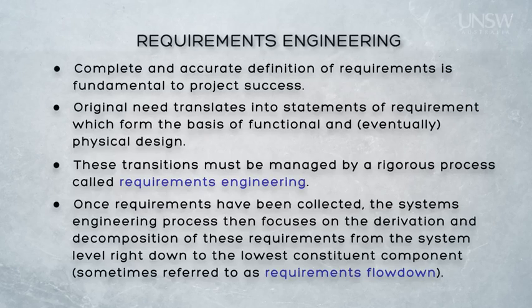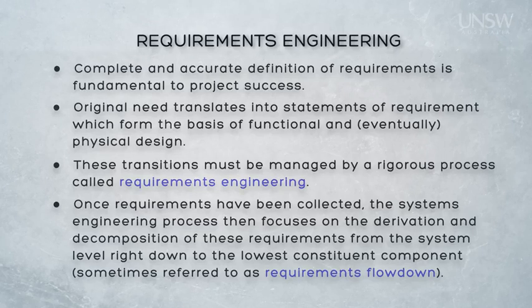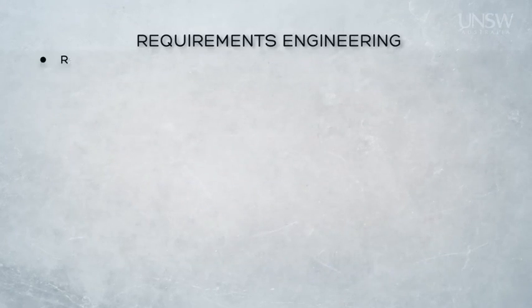This process requires elicitation — that is, identifying the requirements — analysis of those requirements, definition, validation, and then management of the requirements. Requirements engineering ensures that a rigorous approach is taken for the collection of a complete set of unambiguous requirements from the stakeholders so that the system development can begin.